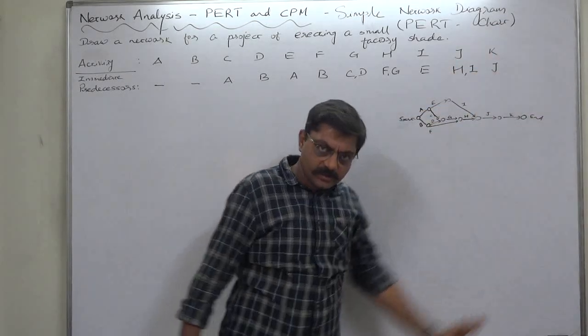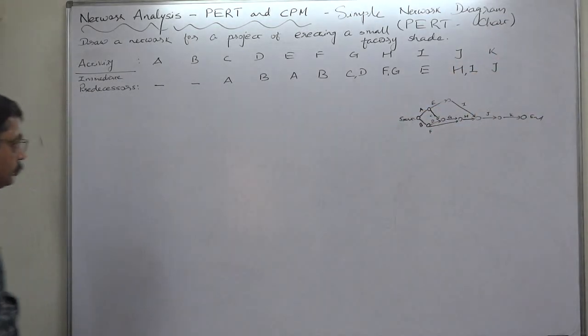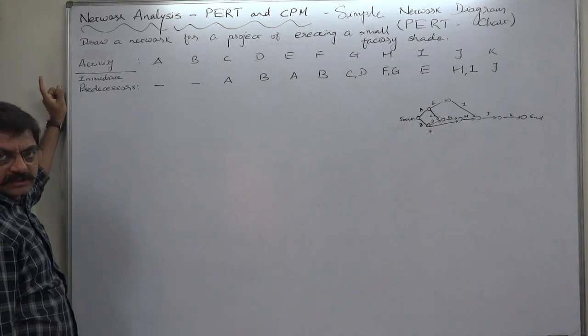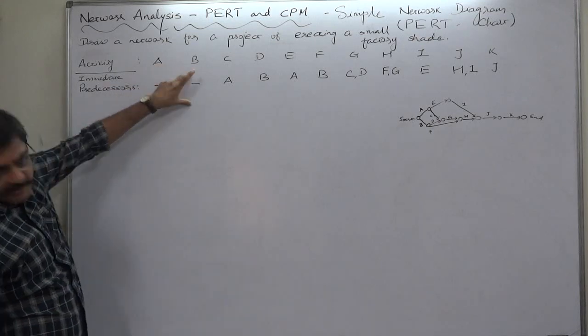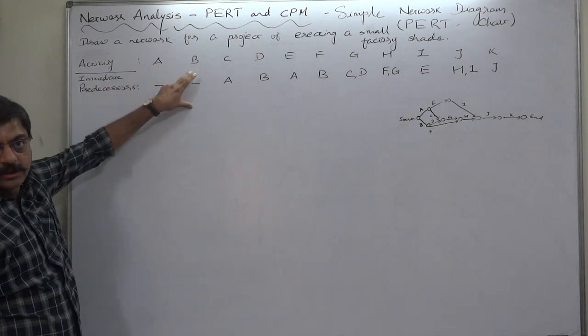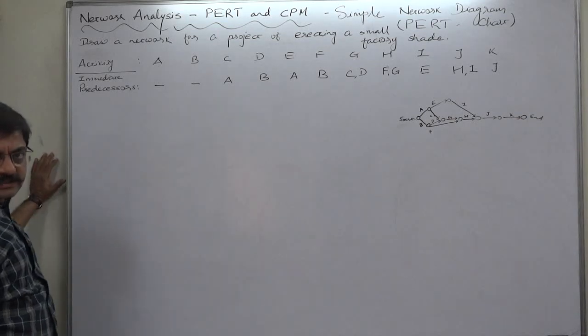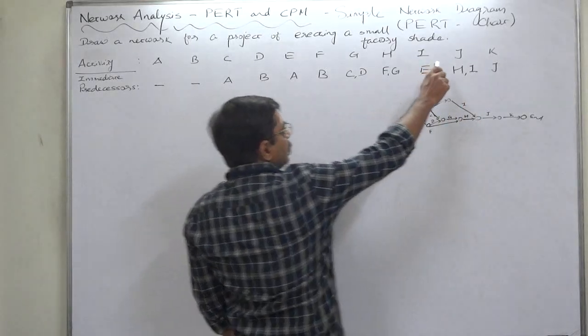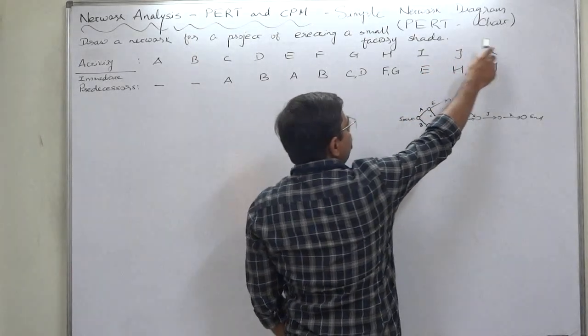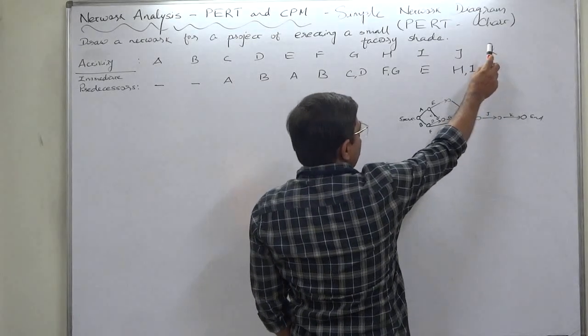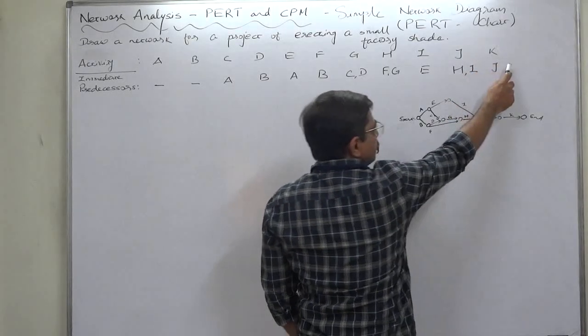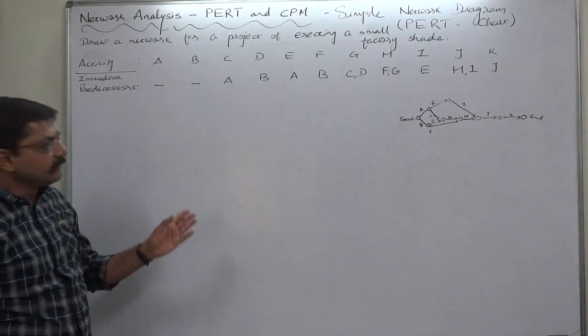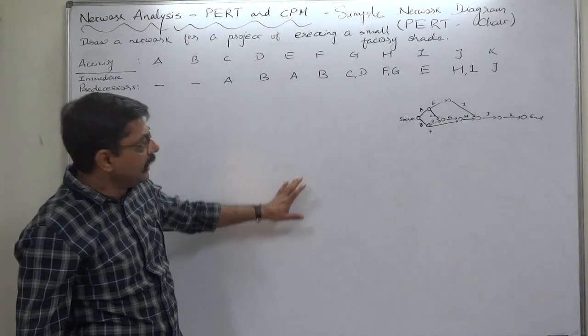Now, first of all, the project doesn't start with only one single activity—the project starts with A and B, two activities. So there will be no single arrow as a starting activity. But at the end, you can see that J has only one successor K, so J and K will be the single last two arrows.